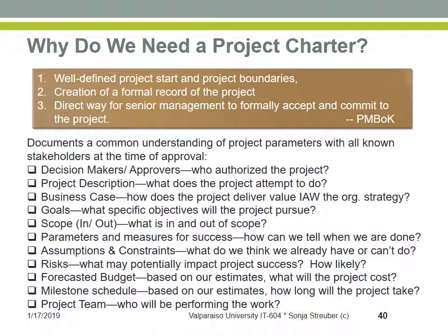Now, if you think back to our first module in which we looked at all the reasons projects fail, one of the major reasons projects have failed in the past is because senior management has not shown an investment into the project. This can be remedied by the project charter being signed by the project sponsor, who typically is a member of senior management.